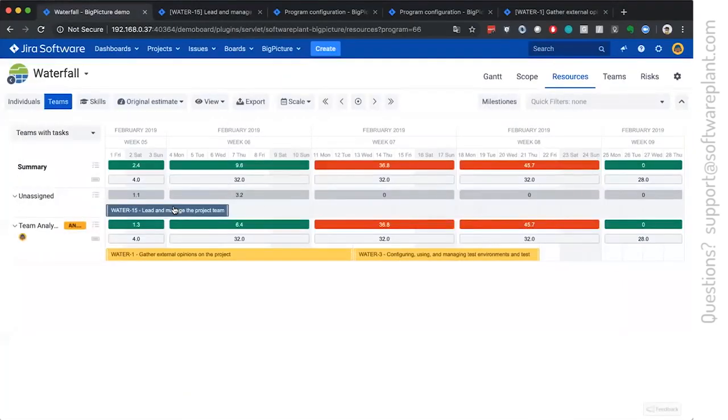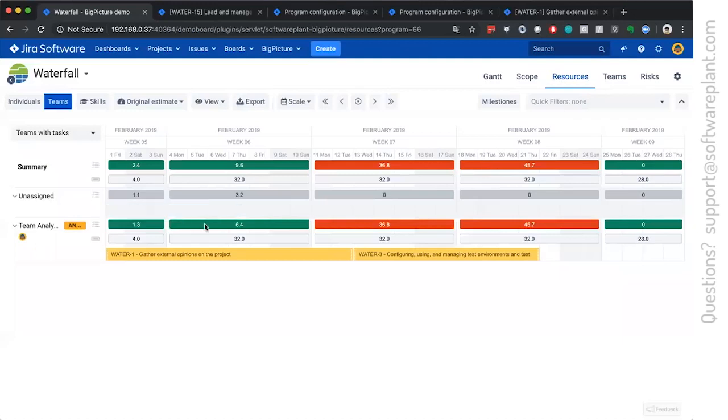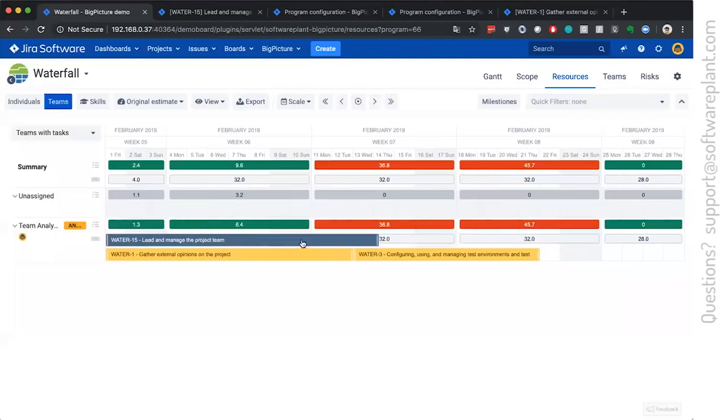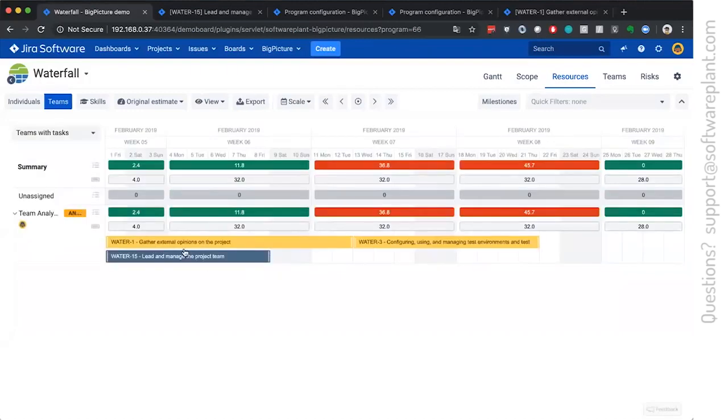Then what we have to do to assign it to a team is drag and drop it to the team analysis row. Let's say they will have to do it here. Everything is in green. So they are not overloaded.